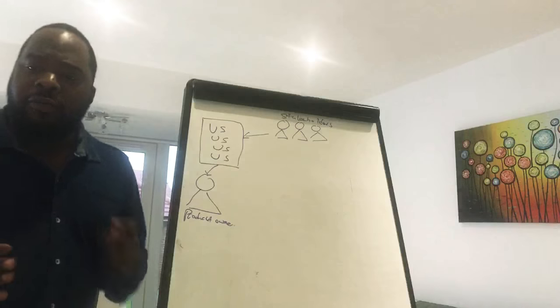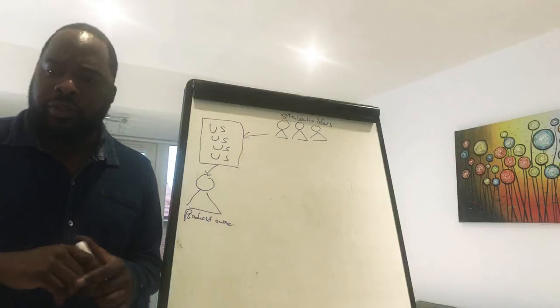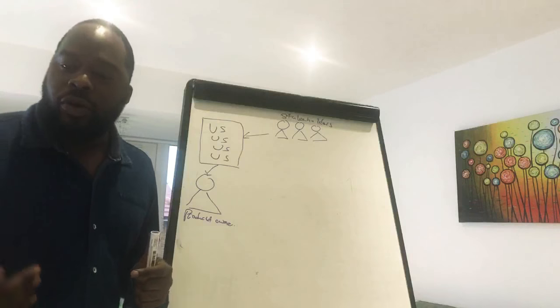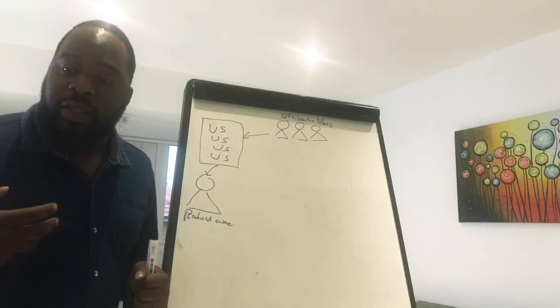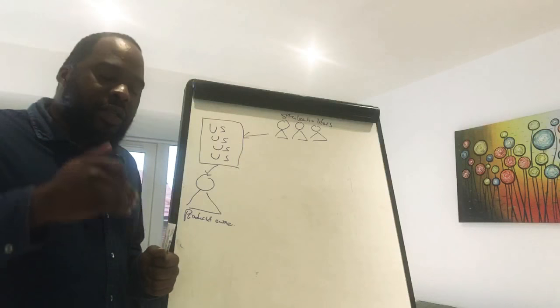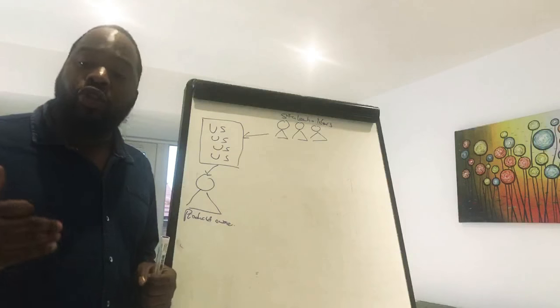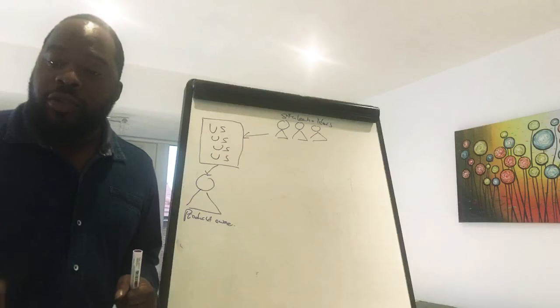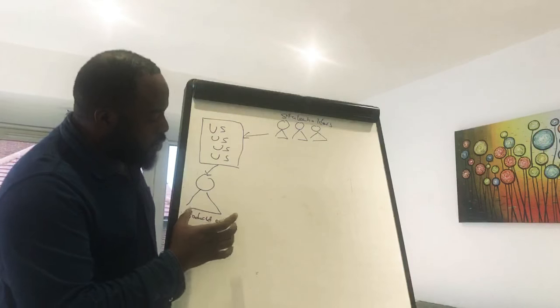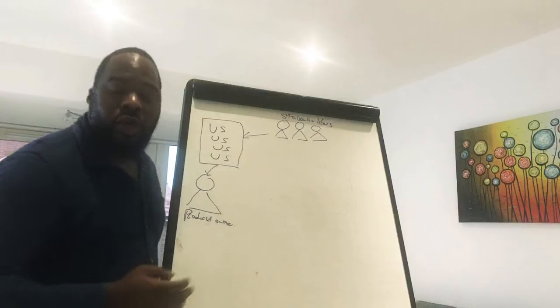Now I want you to look at it from this perspective, and this is very, very important, okay? You just said, based on what you've just requested, as a user, I want to be able to see the status of a project before I join it. That is what you've asked for. So in order for you to see the status of a project before you join it, this product owner is going to have to take that feature and turn it into a user story.